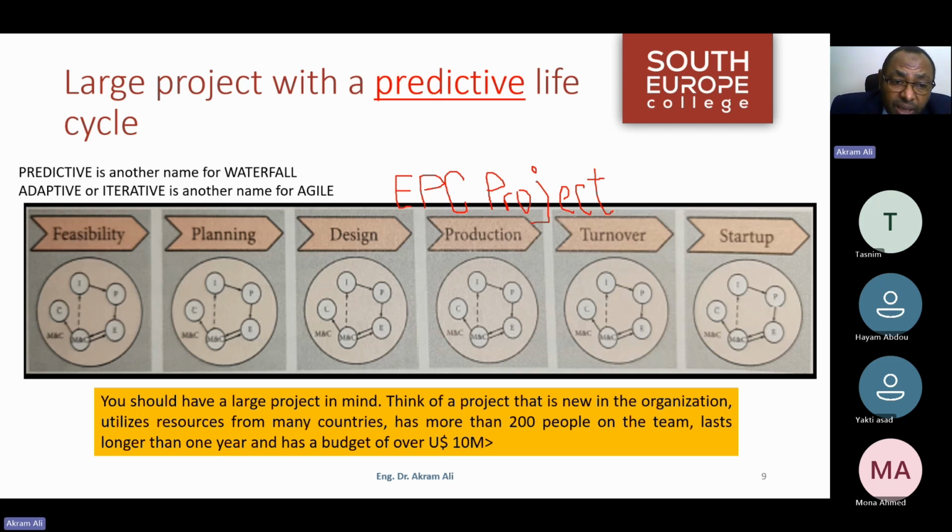So I understand more or less what is expected of the project, and I will also identify the long lead items. So I will be ordering here. Procurement actually will start even before detailed engineering or detailed design. It will start after the FEED design, or during the FEED design itself if a long lead item is really challenging.